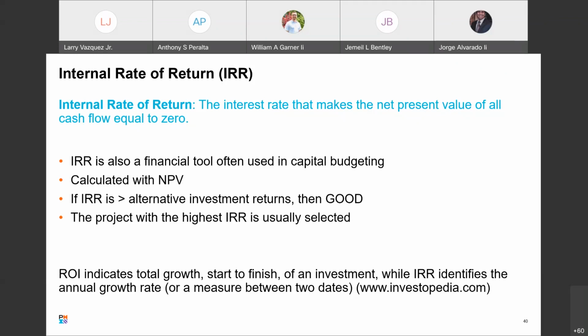It depends on some different things that might be predefined with our finance folks that say, hey, listen, here's the deal. Anything that has an internal rate of return lower than 8% isn't going to be profitable for us as a company, right? So they'll take a look at it. I know the company uses net present value to make decisions on where to spend money. I think internal rate of return by itself is a little unreliable, but they may use it with net present value.